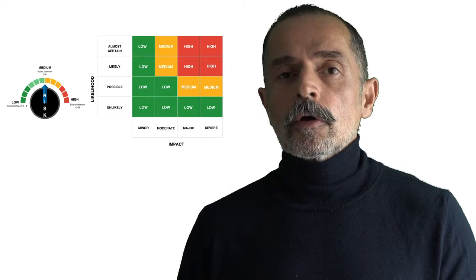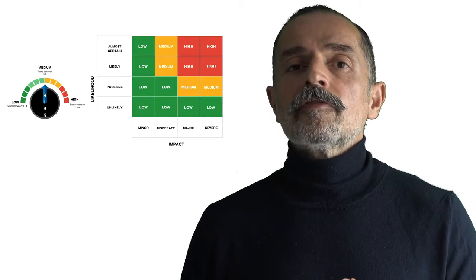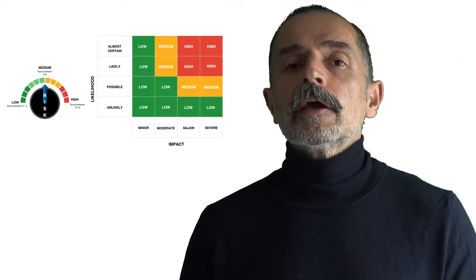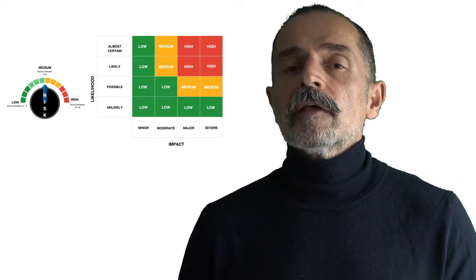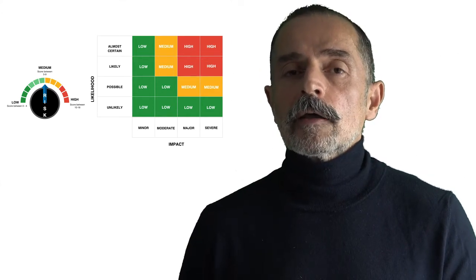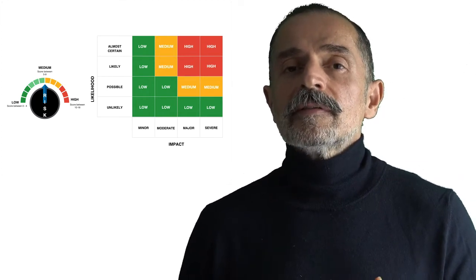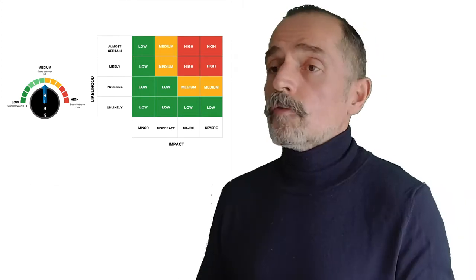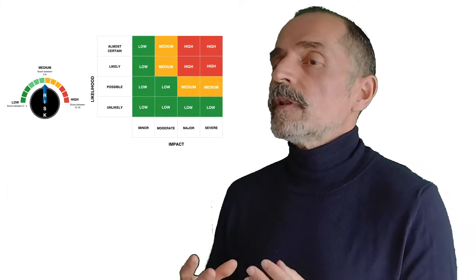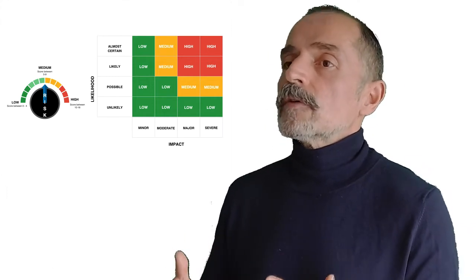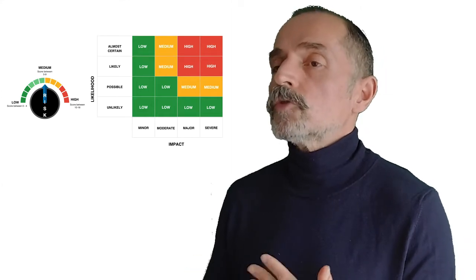Depending on the score between likelihood and impact, we will define proper mitigation activities. Typically, we focus on risks that have a score of medium and high. For the ones with a low score, it's not worthwhile to design mitigation activities. Of course, situations can change during implementation, but risk management is a living body. So you design the risk management during the design stage and then you constantly update your risk management during implementation.